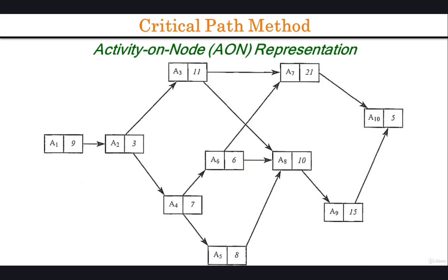First, we create a node in the form of a box for the activity, including its name as well as its expected duration. Second, after creating the node for the activity, we consider the activity as done. Thus, all information provided by the activity to its dependent activities is now available. We can draw a line through the corresponding column and draw an arrow out of the activity for each dependency, for each X in the previous table.